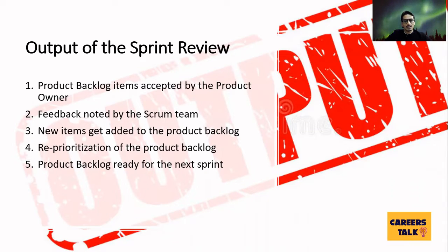The Scrum Master can also talk about the team velocity and how the team is improving every sprint, which also feeds into how much work we can finish in the subsequent sprints. The sprint review meeting ends with a shared understanding between the stakeholders about the accomplishments of the work so far, how much work is pending, and how the work is prioritized for the upcoming sprint.